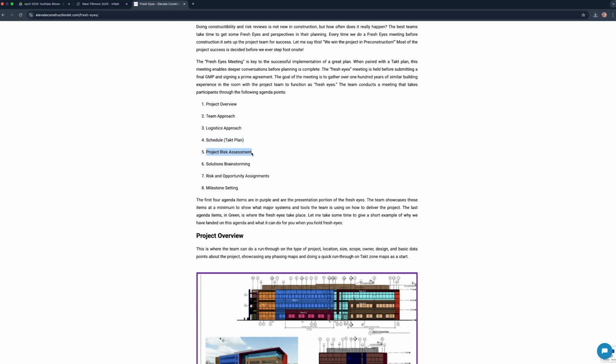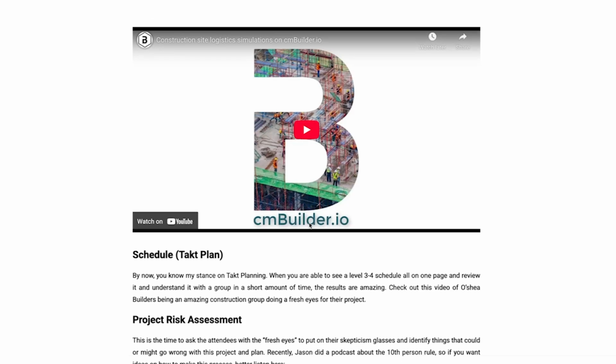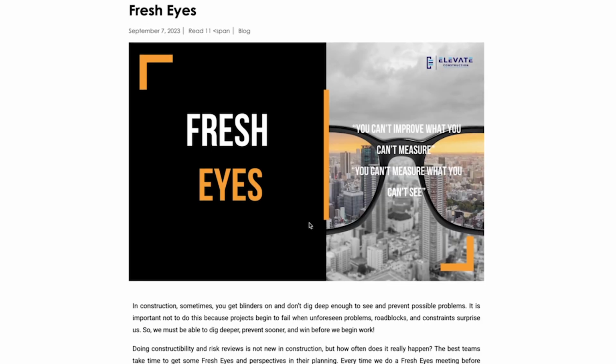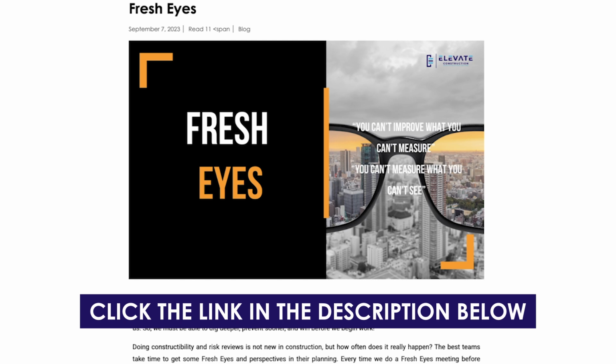You would go through basically a project risk assessment. And actually, let me go back here, where you're only thinking about things that could hurt the project. Then you brainstorm solutions. Then you assign things to the risk and opportunity register. And then you set milestones when you're done. And so we've got a little bit of a blog post here that takes you through that with good instructions. And that's on the Elevate Construction website. And I'll link you to the blog post in the description below.